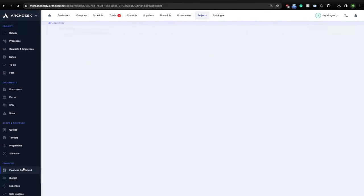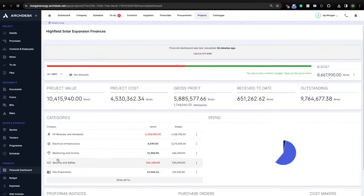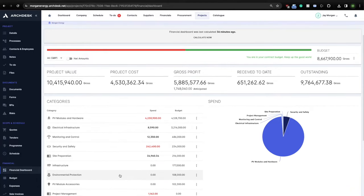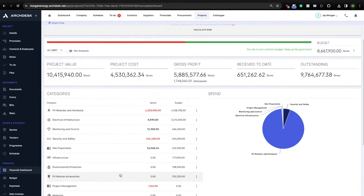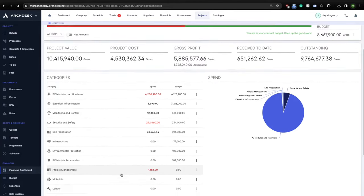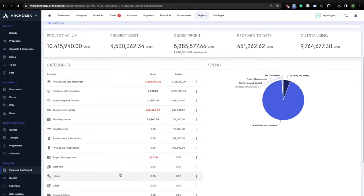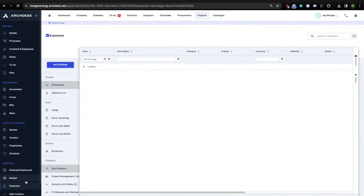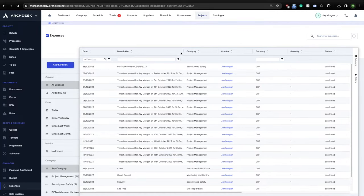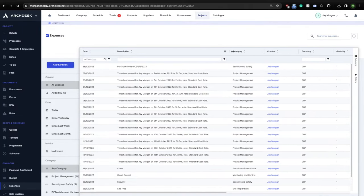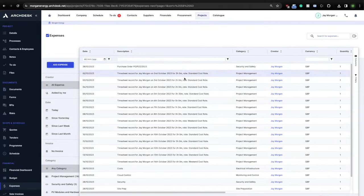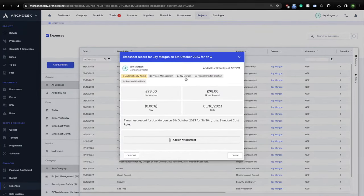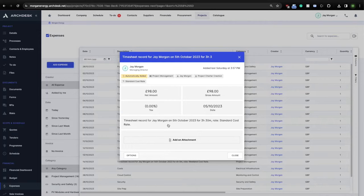Each timesheet record will then automatically increase the cost of the project by multiplying the employee rate by the time spent. ArcDesk will then report your labor cost in real-time on each project. ArcDesk can also automatically update your quote with completion levels directly from the program and therefore fully automate your application for the payment process, closing the full delivery lifecycle, from quote to delivery to payment.